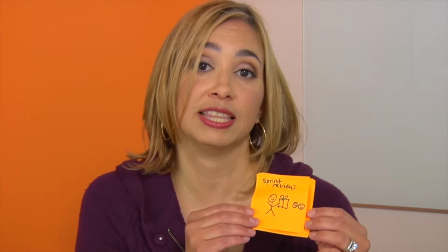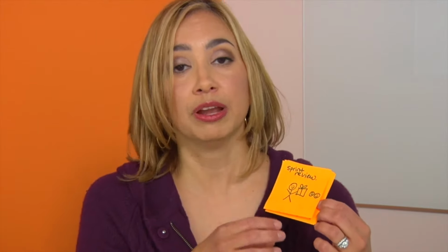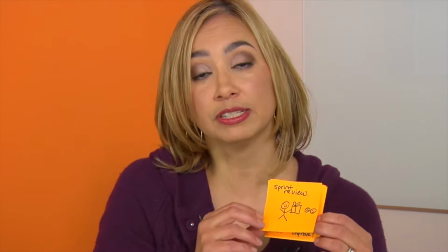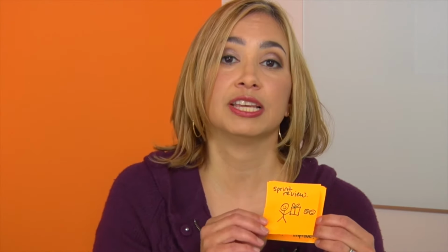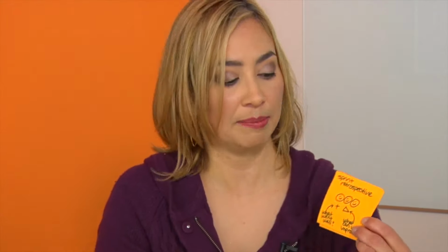At the end of a sprint, this is where you get a chance to show your customers what you've done. And this is in a sprint review. It's also sometimes called a demo. Your product owner is going to be part of it. Your development team is actually going to show the work that they've built, get feedback from customers, and then that's going to inform the next sprint or the next chunk of work that gets accomplished.